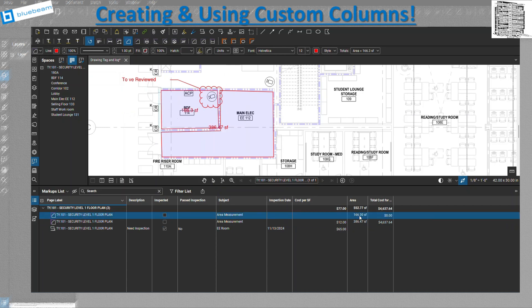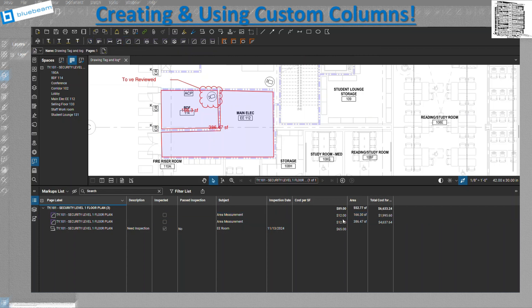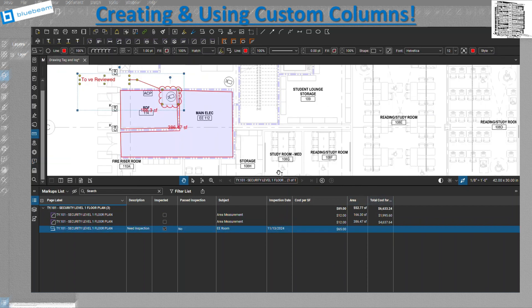Now I have the square footage of the area and at $12 per square foot it gives me the total automatically. As I mentioned, you can use any measurement — square footage, volume — and input your cost to get a calculated total. At the top of the markup list it also aggregates all the square footages and totals. If you selected minimum and maximum options, it shows you the lowest and highest prices across all markups.